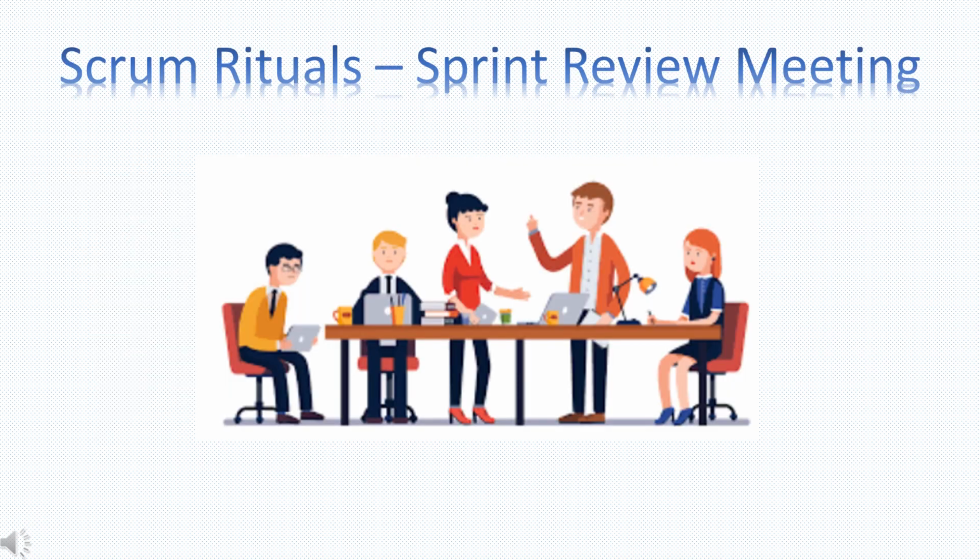The sprint review is held at the end of the sprint to inspect the result of the sprint and potentially make changes to the product backlog. The main purpose of the sprint review is to obtain feedback and foster collaboration. The sprint review is a time box meeting lasting 1 hour for each week of the sprint. So, if we are doing a sprint review for a 2 week sprint, it should last no longer than 2 hours.